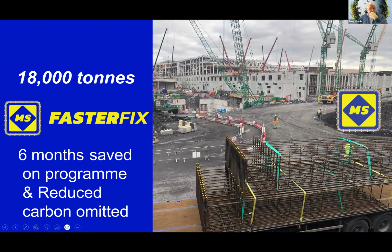This here is the largest facility that we have delivered in the process. It was a 24-month program. By using the offsite manufacturing facilities and process that we have from BIM right through to delivery, we removed 6 months on program in this project.